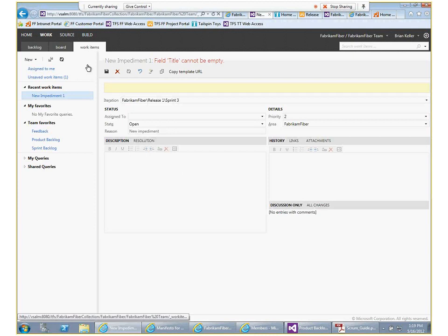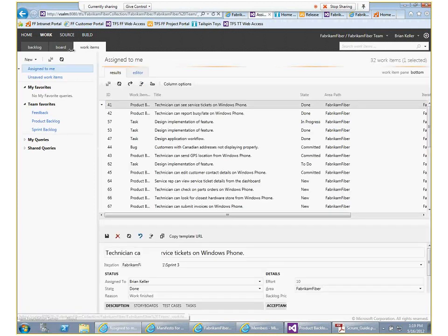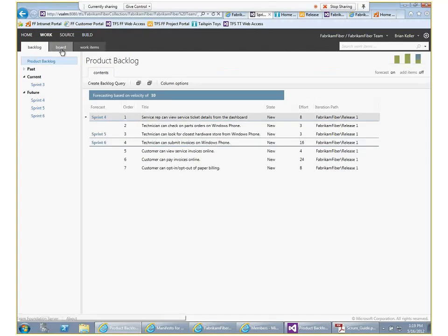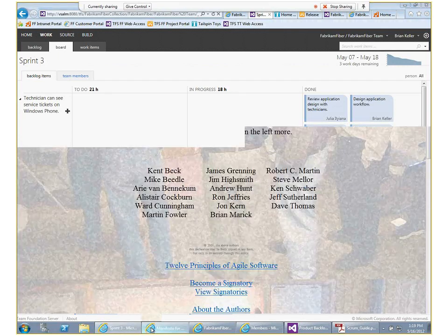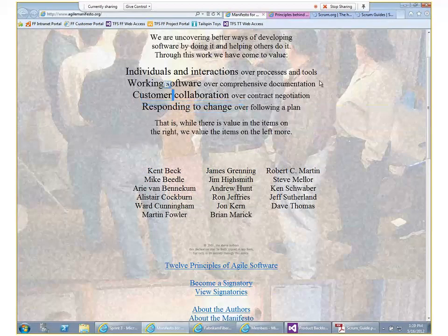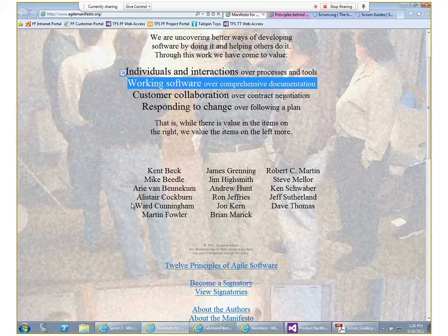So finally, as you go through the development cycle, you have to go back again to the board. The next event would be a review by the product owner, and the working software review, right? Remember that the measure of progress as a principle is that working software over comprehensive documentation is the measure of progress. So what we would like to do is to have the customer look into working software every time that they have to validate something.